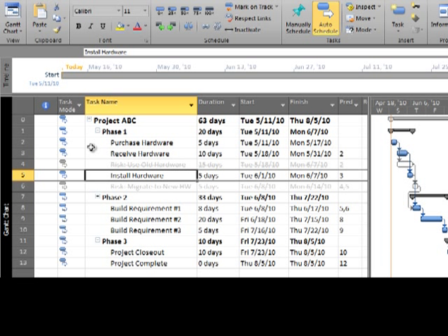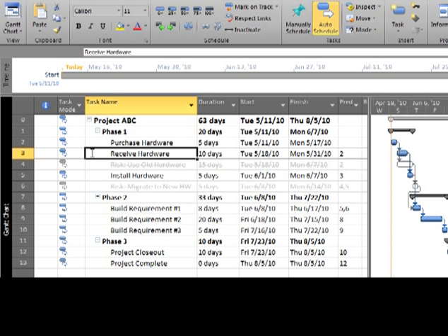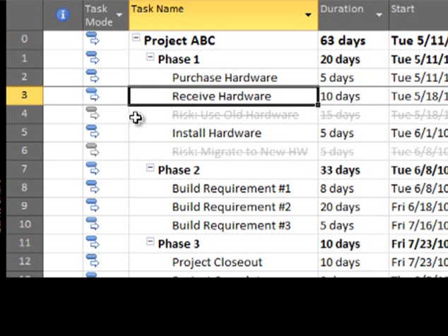However, when I spoke with the IT department, they said that very often the hardware manufacturer is very late in getting the hardware in. And they told me that maybe I should plan for the chance of the project actually needing to use some old hardware for the time being and then migrate it to the new stuff when it comes in.